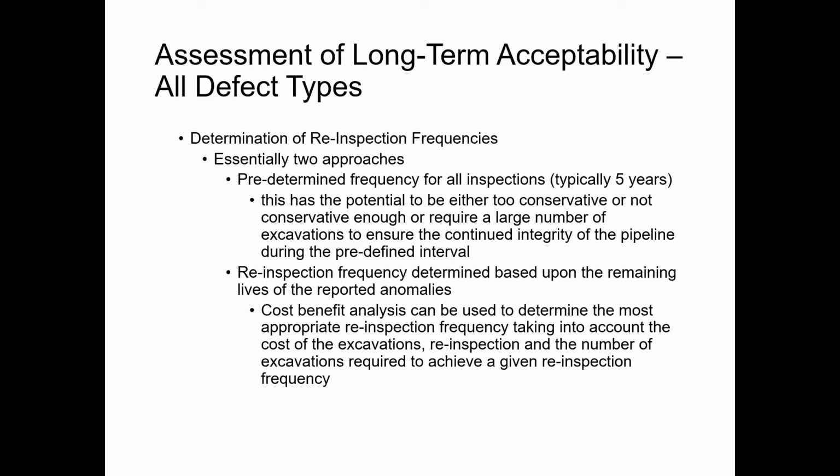So again, it's not a matter of saving money for the sake of saving money, but of trying to make the best informed decisions that you can with the money that you have, and make sure you're spending the money assigned as wisely as possible. So our preference is to base it on the remaining life of the anomalies, and we think that will allow you to better use the funds that you're allotted.